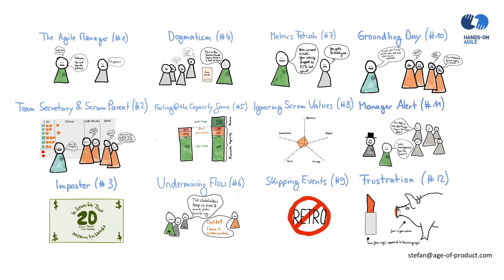Then we had the failure at the capacity team — some Taylorist elements are pushing for 100% utilization and the Scrum Master is not fighting against that. Then we have the case of stakeholders undermining the flow during the sprint.